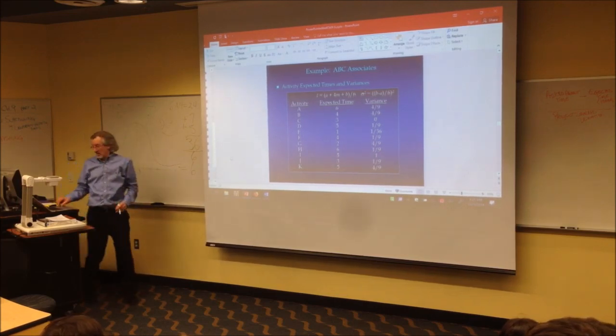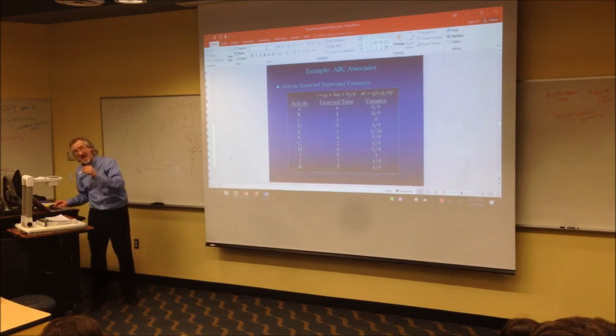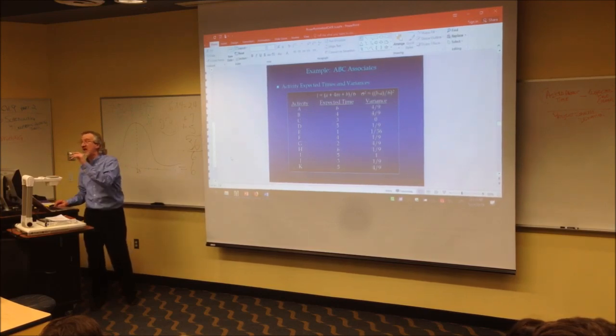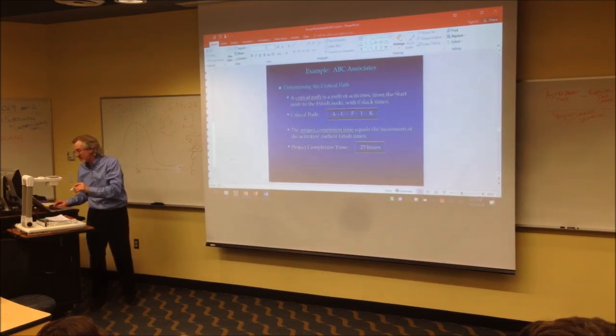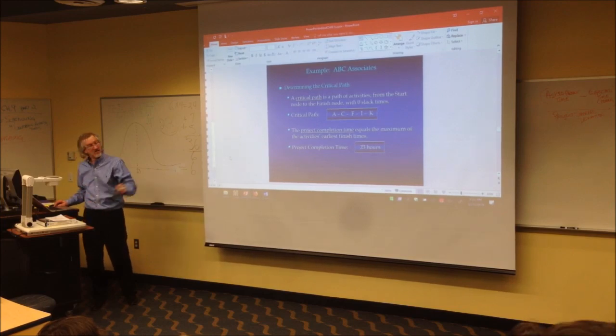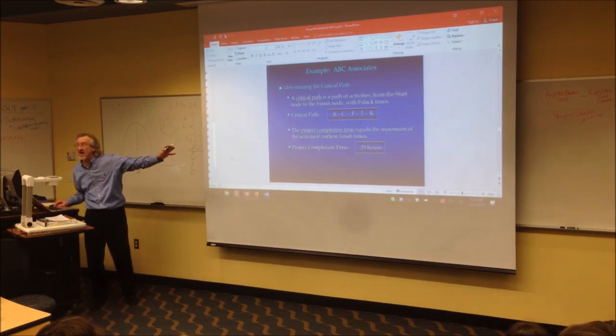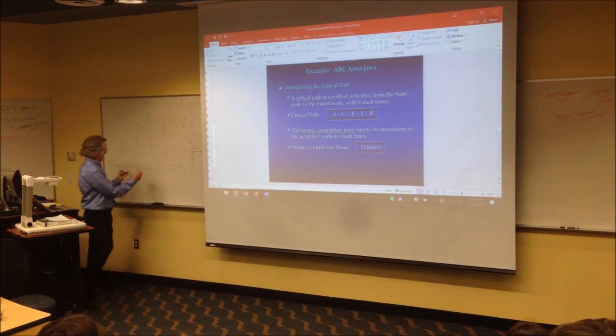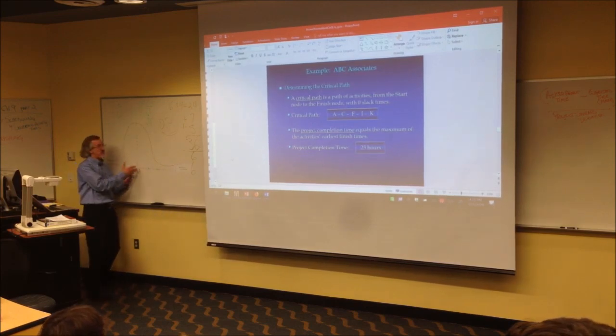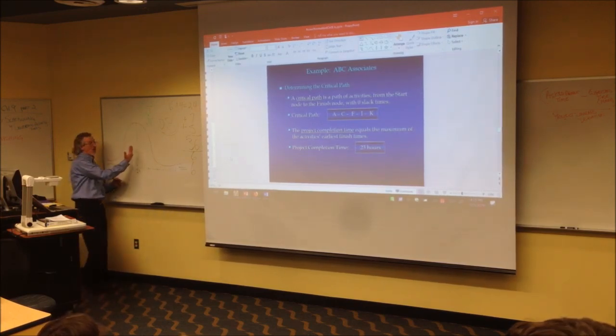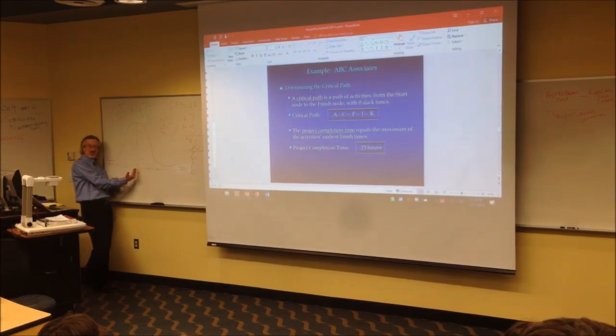0.44444. So we take those 5 activities that are critical, we find the variance, we add the variances together. Are you ready? The critical path, ACFIK. The expected time, 23 units of time. There's our center. By the way, what percent chance is there that this project will get done in 23 units of time or less?